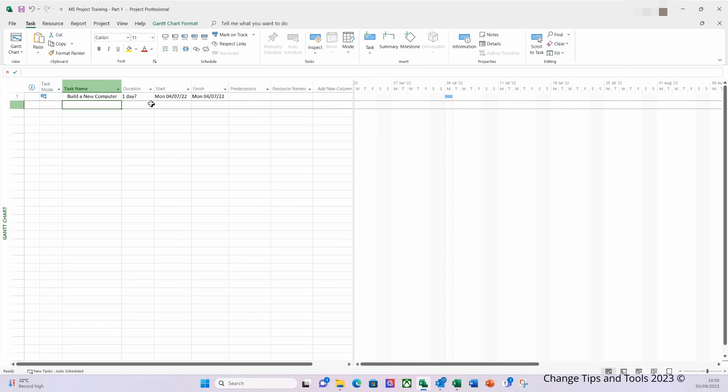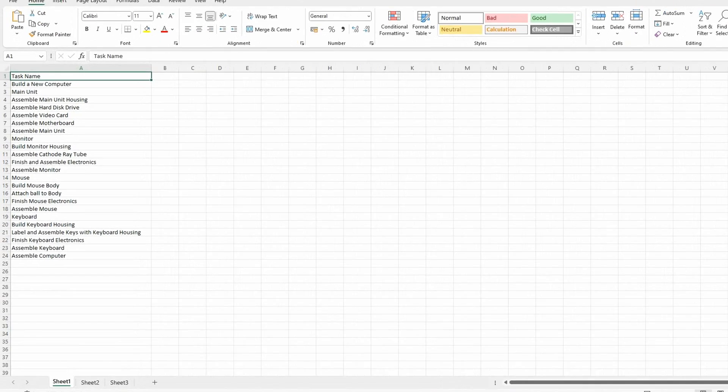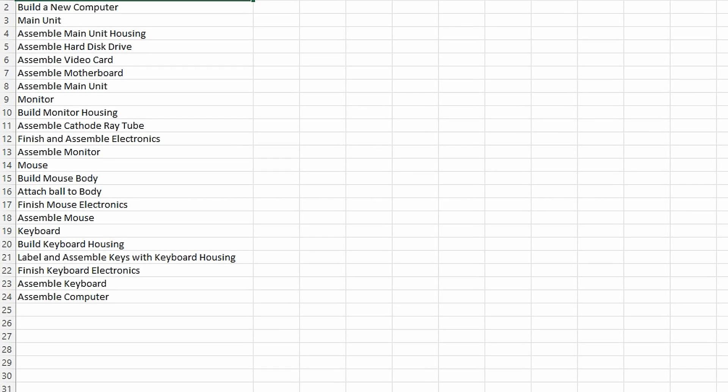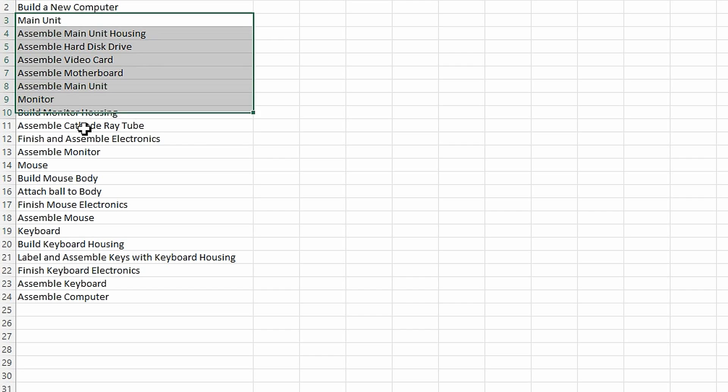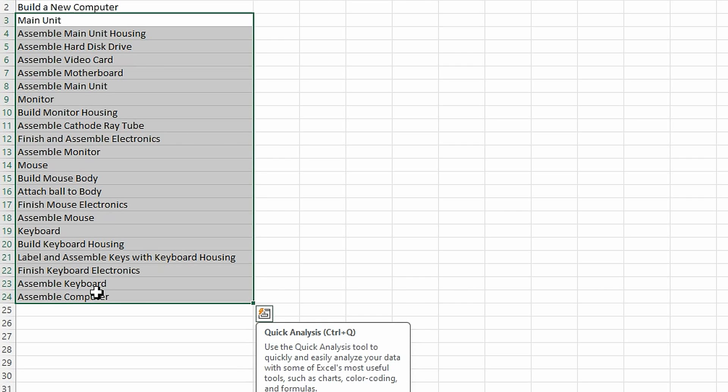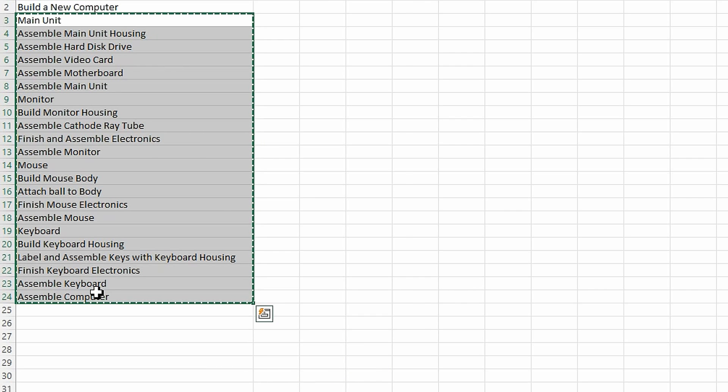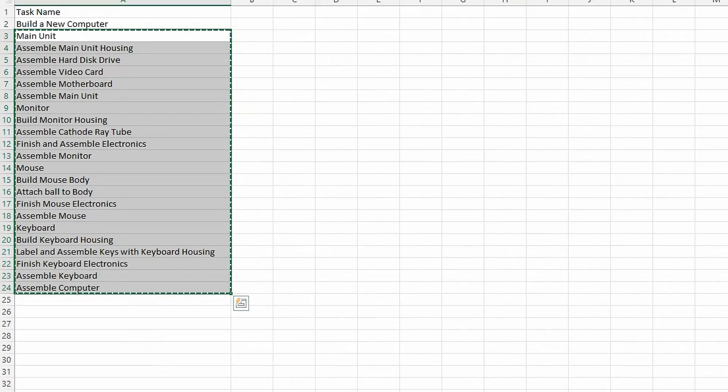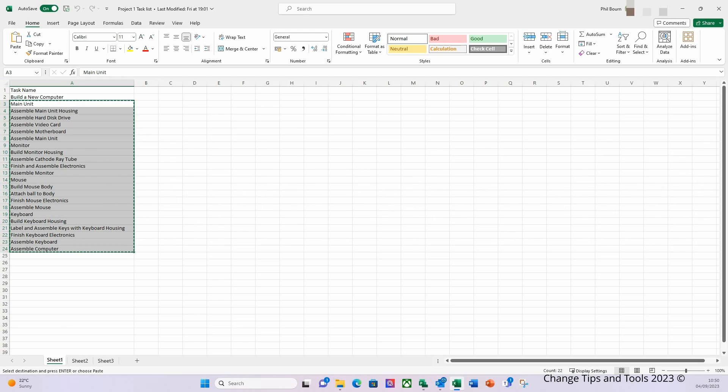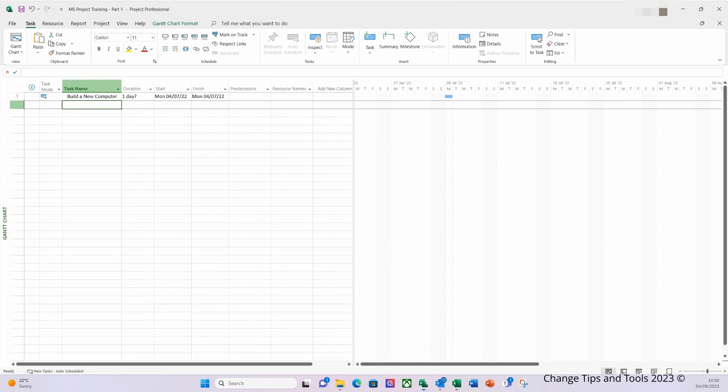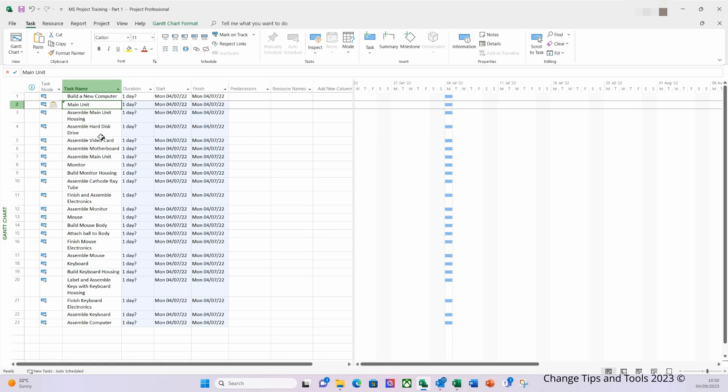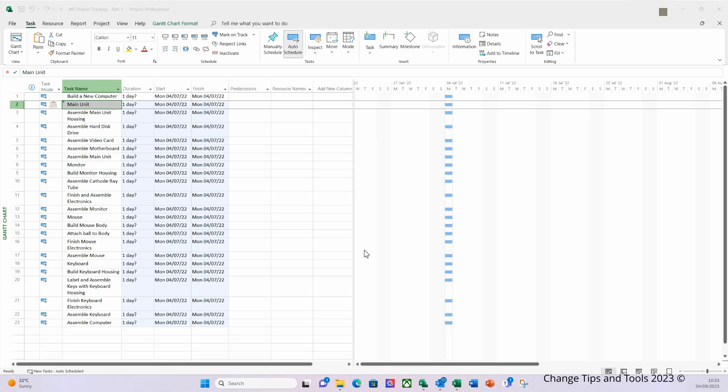So what we'll do now is we will enter all the other activities that are going into this particular plan. Now to save some time so you don't have to watch me typing in this information, I've created a list of my tasks in Excel. I'm just going to select them all, I'm going to copy, and then I'm going to go back to my project file and just below 'Build a New Computer' I'm going to paste those in. And here we can see all my tasks have now been entered.